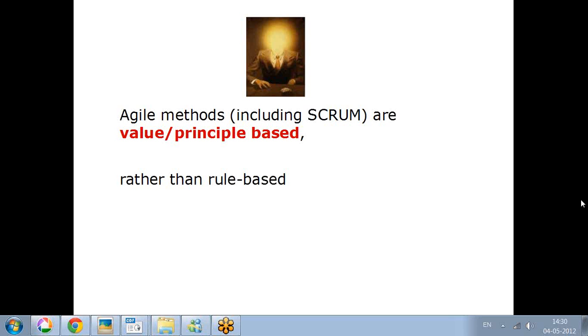So now let's say, Vinod, see, now we have an agreement like, okay, I'll prepare you for PMI-ACP. That is the scope. And now if you come and ask me, maybe I want to do PMP as well, should I say no to it because there is a scope change now? I need not say no, but at the same time it cannot be free. So in any project management, there is a connection between time, cost, and scope. When the scope changes, the cost changes, and the timeline also changes sometimes.